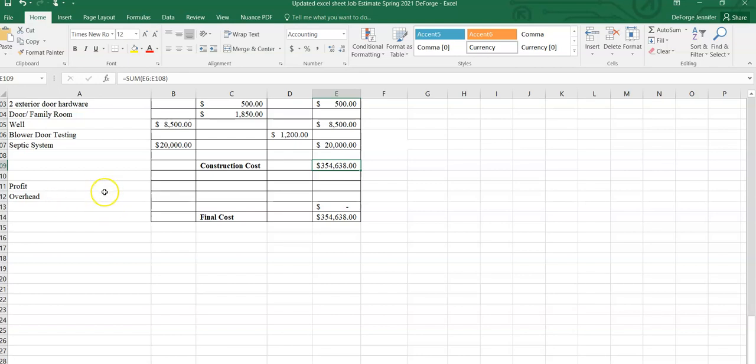So their profit and overhead is going to be at the higher range, in that 11 to 12% range. When I first started, I was in the 8% range, and I still am. I don't go up too much on it. I do make money off of some of the materials up above here as a general contractor. So I've learned that 8 to 10% is a pretty good average for me when I'm doing new construction houses. For smaller projects, those percentages are going to increase.